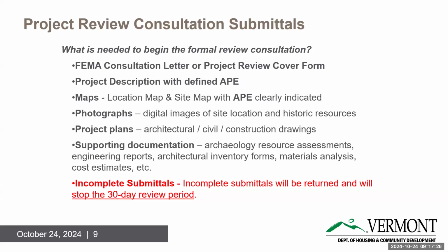We don't always know what project that is. So it's really important that if you've got a consultant working on some of the submittal, that they use the same cover form or consultation letters and submit really through you and then feed it to us. Otherwise, we get delayed because we don't know what something is.